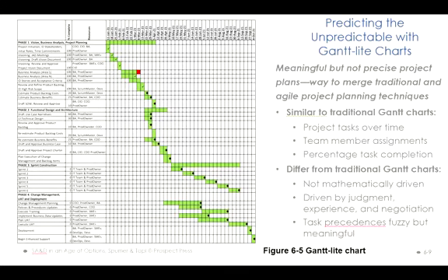The other improvement of this Gantt chart compared to the traditional Gantt chart is that it also includes an additional dimension. This additional dimension is called responsibility assignment, in the way that it links the project management in terms of human resource management to time management. And the Gantt chart itself is, of course, a scheduling tool, so it is a time management tool.